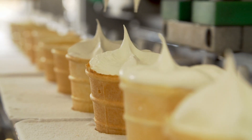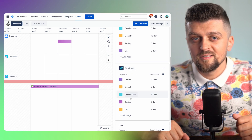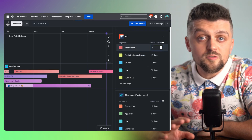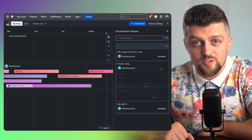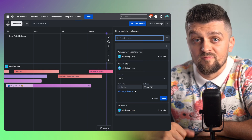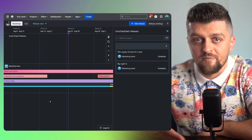Every team works on various activities, and depending on the type of activity, the workflow differs. So it makes sense to have repeatable delivery templates for feature launches, marketing campaigns, or change management. Swanly not only offers different workflows and phases based on the type of deliverable, but you can also register a standard duration for each stage. This makes life a breeze when planning an activity that follows the default execution plan — just specify when it's supposed to start or finish and Swanly will auto-schedule all the stages.